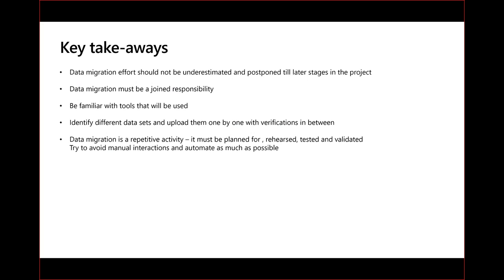And it is key and essential that your data migration is done correctly, because if you go live on data which is not correct and you start doing transactions already, and then you need to correct the data which has those transactions already, you can end up in really nightmare scenarios.